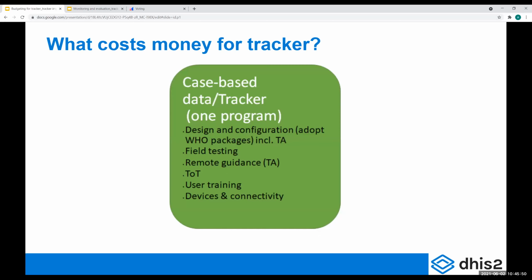You need to set aside time and finances to test this out, and don't assume that one approach works for all, and don't procure all your devices before you have even tested. So maybe you start small and you try it out, and then once you know what works, you can make an informed decision and do the rest of the device procurement after that.